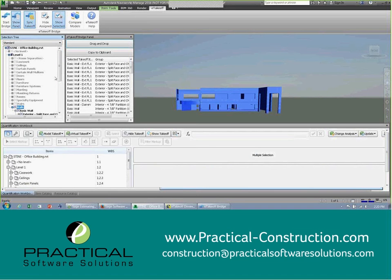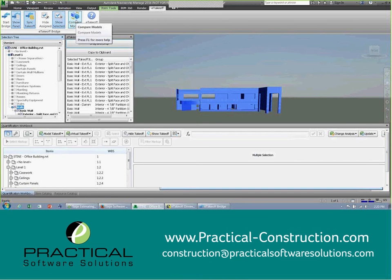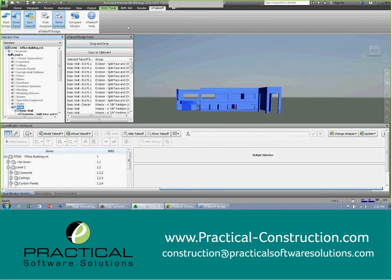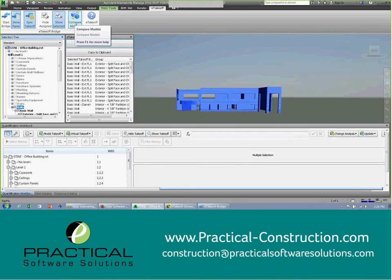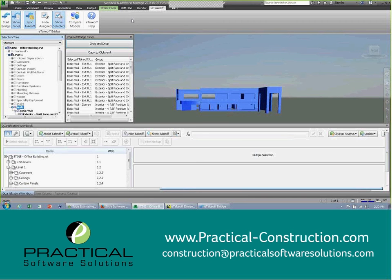Last but not least, and we won't get into this functionality, but it is available now, is compare to model. So how many times do you get a rendering of a model and then get the revision to that rendering? Well, this will compare the two models against one another and show you the differences between the two. And with the click of a button, we can update the estimate and keep it relevant to those new changes. Very powerful.